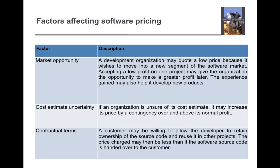The third factor is contractual terms. A customer may be willing to allow the developer to retain ownership of the source code and reuse it in other projects. In that case, the price charged may be less. If the complete source code is handed over to the customer, the price is different, but if the developer reuses that code across different projects for different customers, the pricing will obviously be less.